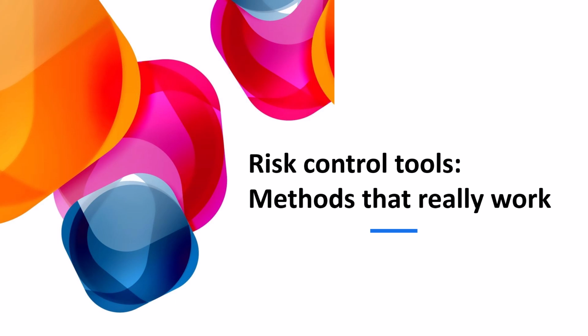One you hear about is workarounds. Sounds a bit makeshift. Well, in a way it is. Workarounds are basically unplanned solutions. They're what you do when a totally new risk, something you never even thought of, just appears. So completely unforeseen, reactive. Totally reactive. You didn't plan for it, it happens, and you need to figure out a solution on the spot, like putting out a surprise fire. Right. Damage control for the unknown unknowns.